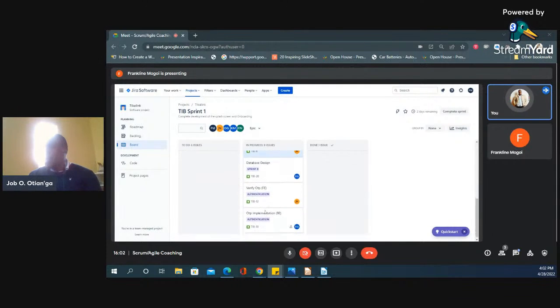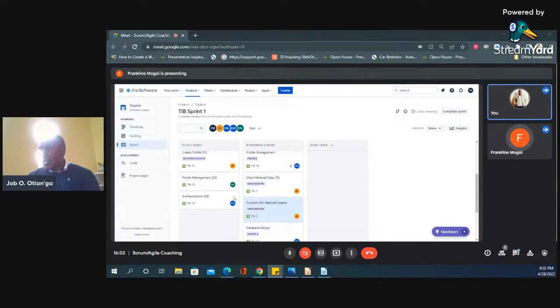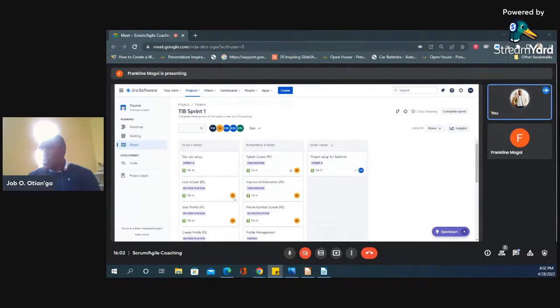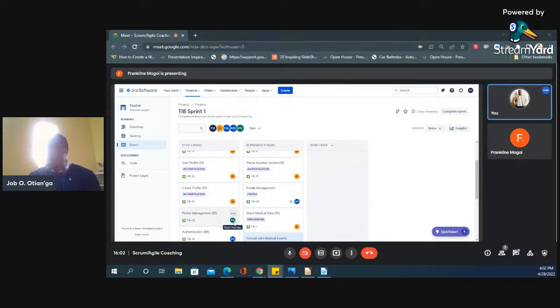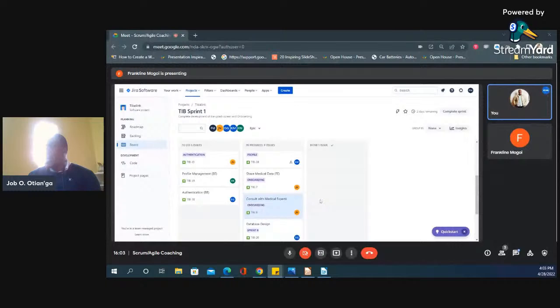One of the things we need to know is the capacity for the sprint. I can see only two resources: James Nyakundi, and then who's the other one? DG. Who's DG? Dennis Gatere. We need to know whether they are taking up too much, or whether they are also involved in other deliveries, which makes it difficult for them to focus on this particular product delivery. So resource availability and capacity is the other thing that needs to be brought to the surface.